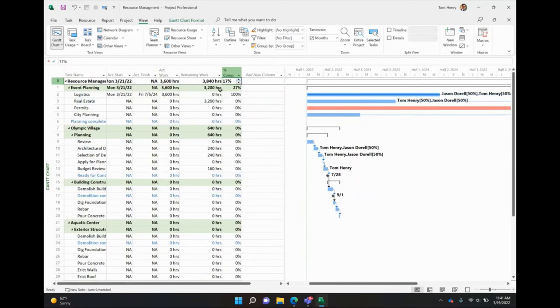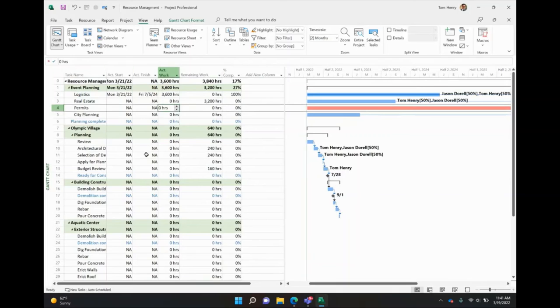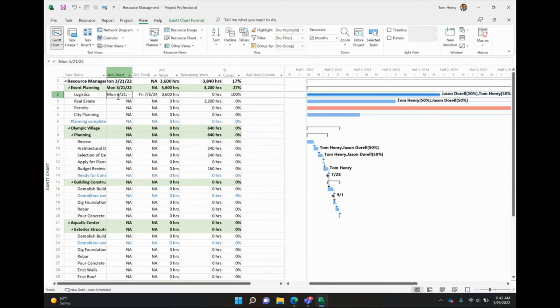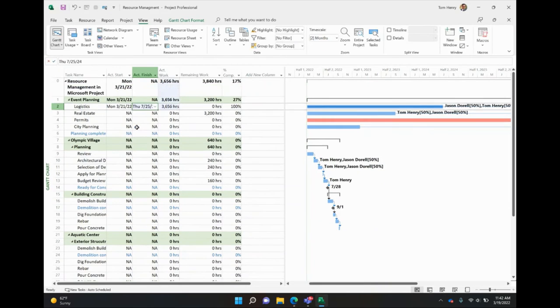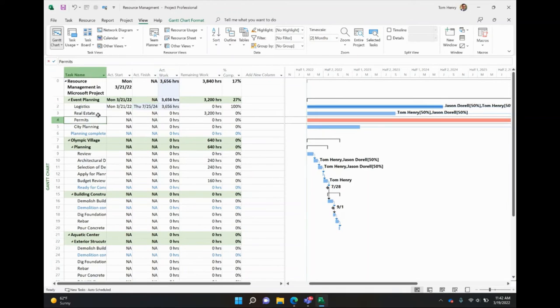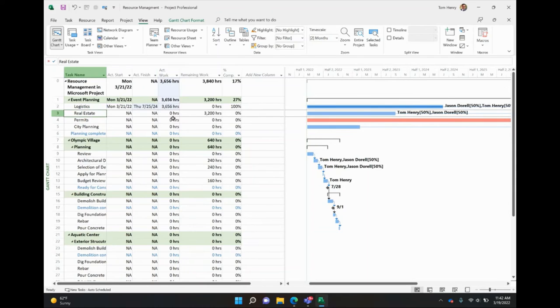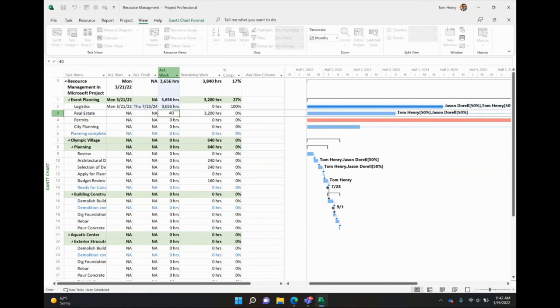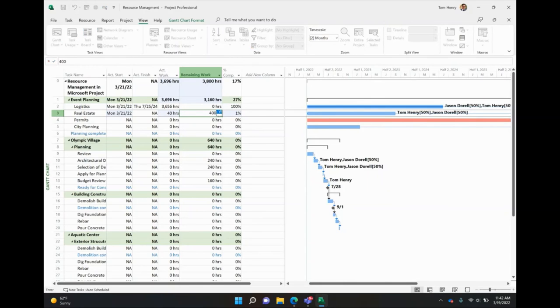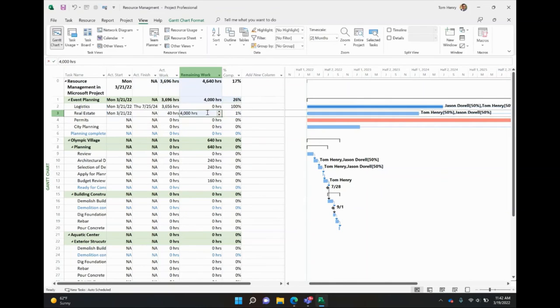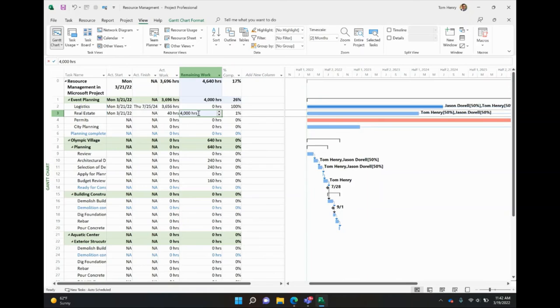And you can reorder these as well. Let's move that over here. This is the way I like to set this out. And what I'm going to do, you can see this one that we've actually tracked work in here. After the fact, we can come in and say, well, it actually took a little bit longer than originally planned. That's going to affect the actual work. I'm going to show you how we're going to track the real estate. So we can say how much work was actually done. Well, over time, they're going to give you updates. Oh, I've done 50 hours work this week or we're at 40 hours this week. I've done 40. How many is left? Well, I've still got 3,160 hours left to go. Are you sure? Oh, I didn't really get much done. So maybe we're still at 4,000.